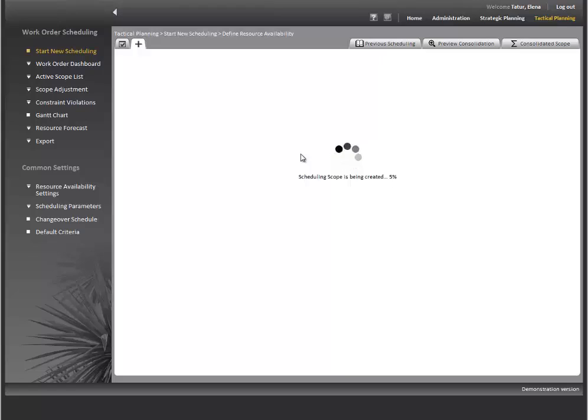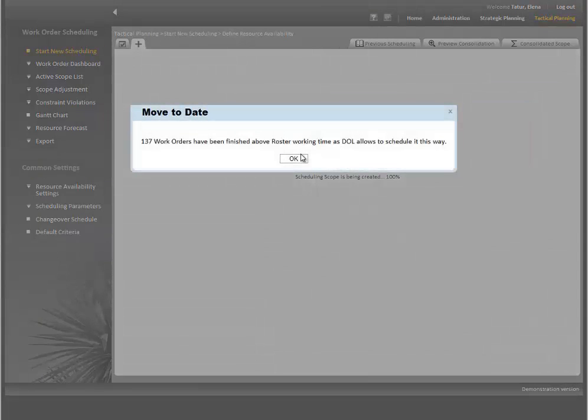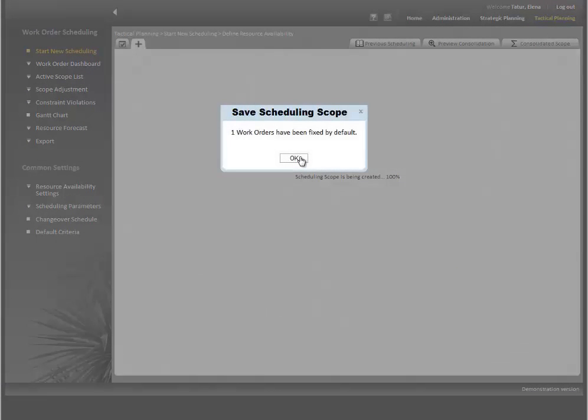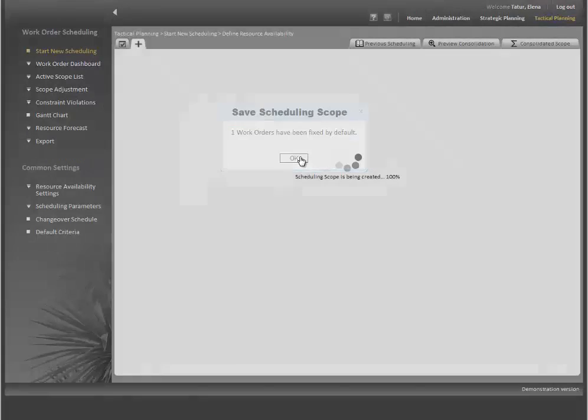Planner Group schedules only within available Planner Group resources. But we also have shared resources, like supportive services, which work for all business units. Also, we have production resource and tools, which are basically shared equipment which is needed to do maintenance activities. So, before we start scheduling, we need to define these resources.